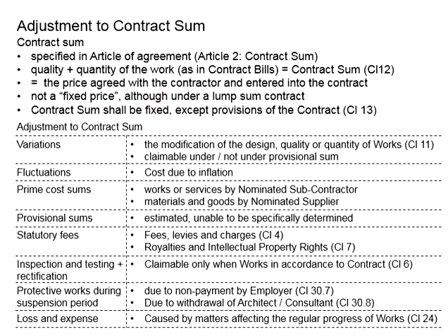Or in the case that the contractor has a bad reputation or track record on some part of the works which has already been proven not meeting the requirements as per the contract. As a precaution, subsequent works which are reasonably doubted to also be affected by the substandard work, the inspections and testing were called out. Now the responsibility is due to the contractor. The relevant cost is not claimable, and therefore the contract sum cannot be adjusted.